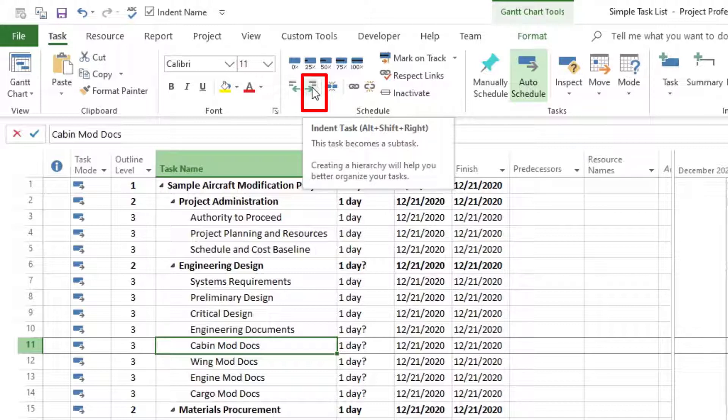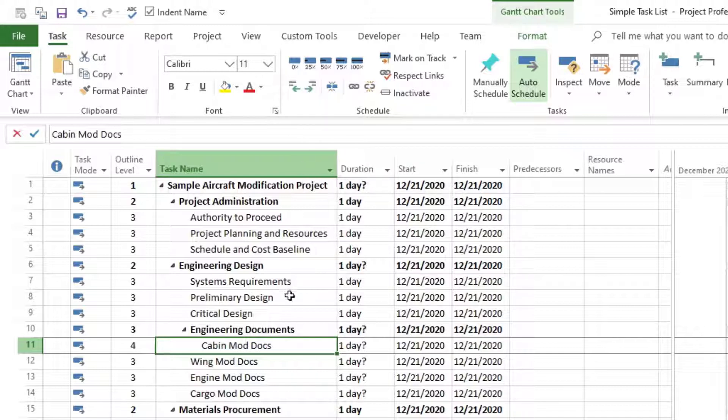And then this task becomes a subtask. Creating a hierarchy will help you better organize your task. So that's what we're trying to do. We click on indent task. And now we have this task indented.